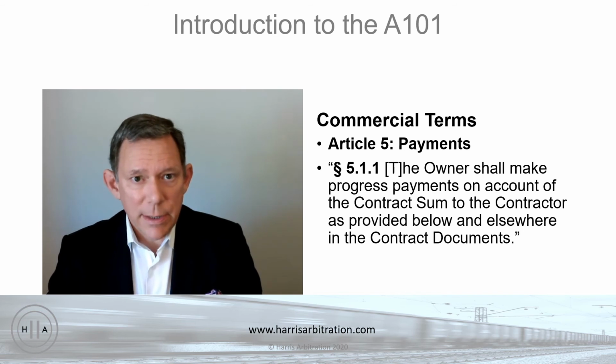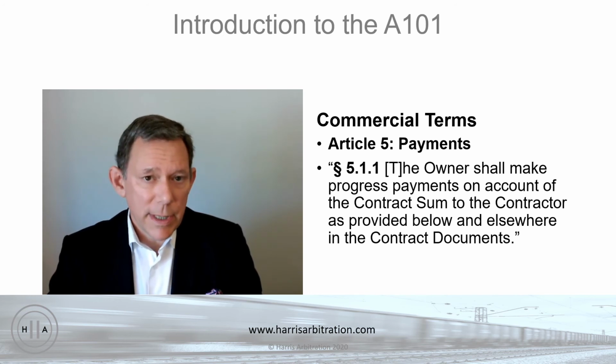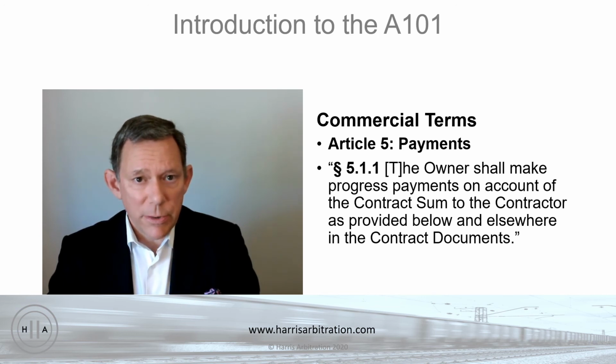The contractor at least gets the benefit of the doctrine of substantial performance. It says, okay, once the contractor has substantially performed, then the owner has to pay something. But the general common law rule was unless the contract is, quote, severable, where you can sever out one bit of performance to a corresponding amount of consideration, the rule is that the contract is entire, that is to say that the contractor has to perform all of the work before it's entitled to any payment.